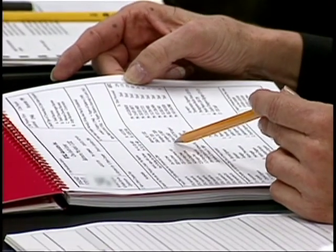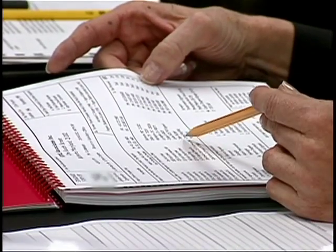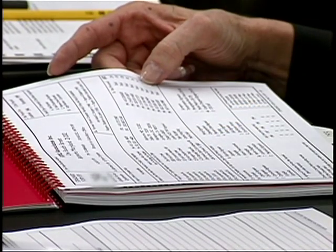The lead designers and their firms will be given 30 to 45 days to assemble comprehensive AE teams. They will submit detailed information in Standard Form 330 on their team's technical qualifications and professional experience. The board will then reconvene at the GSA regional office to interview each of the lead designers and their team. It will rank the teams based on the interviews and the information provided in the SF 330. The ranking with supporting evaluations will be given to the GSA selecting official.